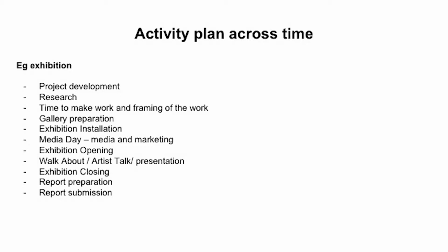Preparation of the gallery, so organizing a gallery space, going to view the gallery space, then the installation of the exhibition. You could include a media day, so a day where you invite media to come and see the exhibition, but you should also consider media and marketing throughout the process of your project. And then obviously the opening of the exhibition, a walkabout, a talk or presentation that you want to have as part of the program, the closing of the exhibition, so when it ends, if you want to have a closing event or not, and then finally the report preparation. So you prepare a report, you report on the entire experience of the project and the process of realizing it, and then you submit your report to the funder.